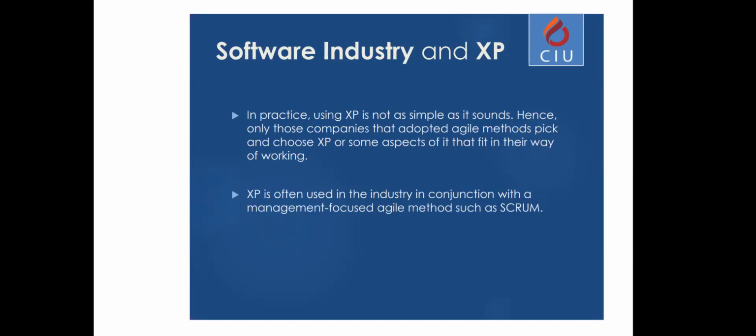XP is also often used with management focused agile methods such as Scrum. Now, the big difference between XP and Scrum is that Scrum is a way to manage the software development, whereas XP is a way to practice the development of the software itself. Okay, please do understand the difference. Scrum is more focused on the management. XP is more focused on the development of the software.